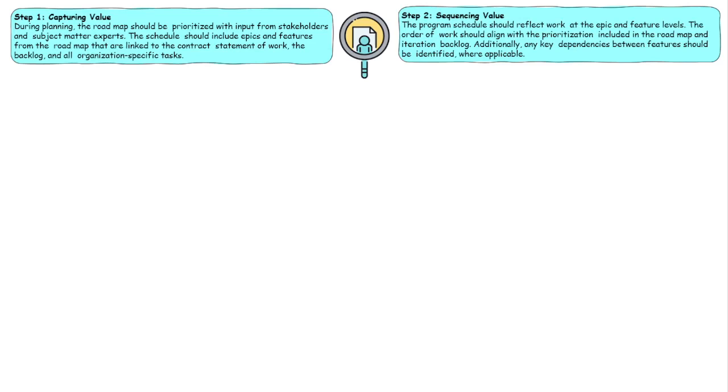The product owner is a role in the world of Agile. And in the world of Agile, the product owner knows what to sequence first. What should come on the scene first? We prioritize based on value. We prioritize based on a number of things. We could take risk into consideration. We could take the marketplace conditions into consideration. But the sequencing, you got to remember, it's not at the lower level of tasks. It's at a higher level, okay?